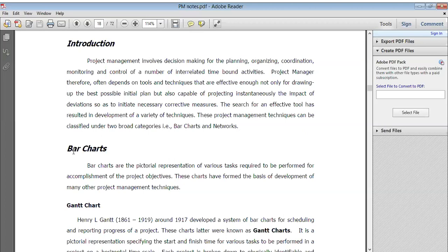For example, if you prepare a budget, your budget cost is 2 lakh, for example, and the project cost is 2 lakh 5,000. Okay, that means 5,000 extra spent in your project. So you need to give justification for the extra 5,000 because that 5,000 was not added in your budget, right? So when you prepared the budget, why did you not add that 5,000? Why did you not take a tolerance, rate of tolerance we call that, but we are not adding.